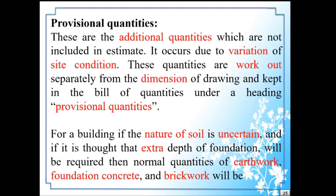Next one: Provisional Quantities. These are the additional quantities which are not included in the estimate. They occur due to variation of site conditions. These quantities are worked out separately from the dimensions of the drawing and kept in the bill of quantities under the heading provisional quantities. Due to variation in actual site conditions, whatever additional quantities arise are called provisional quantities, and they are worked out separately based on actual dimensions.